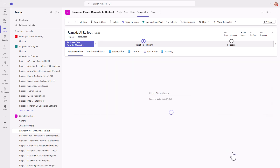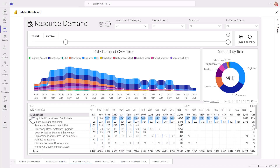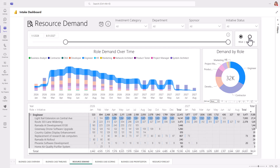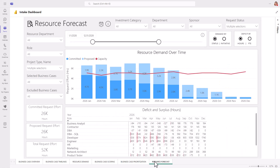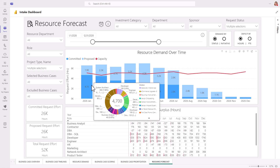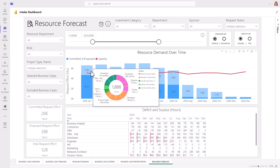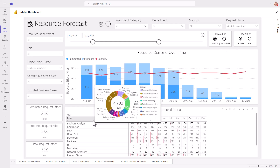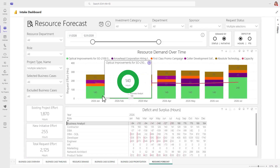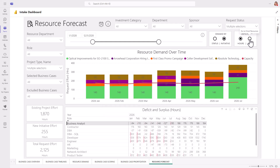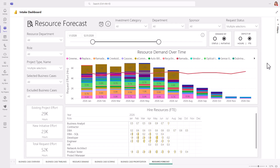Once the resource plan has been built, it's submitted for approval. You can now see the total proposed demand for resources, both by role and by initiative, from all resource plans. And in a quarterly or annual planning cycle, you may also want to compare the incoming demand with approved allocations on in-flight projects. In the example here, dark blue represents committed allocations on existing projects, and light blue represents the proposed or requested allocations on new business cases. The red line is resource capacity, so it's easy to visually see when that is exceeded. If you also have a prioritization process in place, then you can view the order in which you should staff projects. And the hiring report shows how many FTEs you would need to hire for each role in order to get everything done.